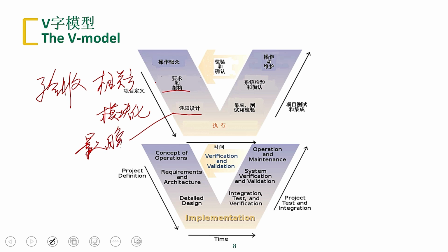Safety requirements, generally speaking, are not considered in the operation stage or project initiation stage, but at the latest, we need to consider safety in the detailed design stage. Otherwise, this safety cannot be embedded. For example, if we have started writing code in the execution stage and you say I embed safety functions into this code, it's actually difficult, like 3A, such as authentication, authorization, billing.